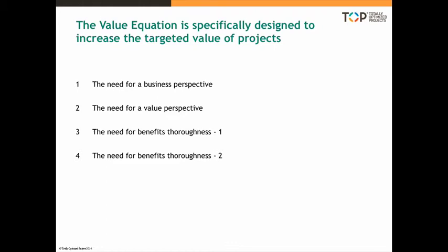Once the initial list of benefits has been identified, this 6-category benefits identification process is repeated, but this time using the recently identified benefit statements as the basis for identifying benefits. So for each existing benefit statement you ask, what customer, competitive, capability, productivity, financial and risk reduction benefits can this benefit deliver?